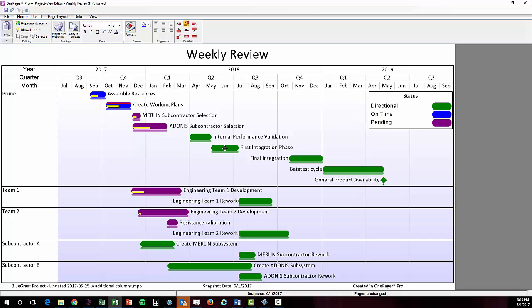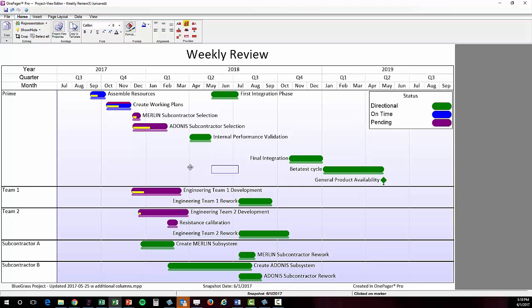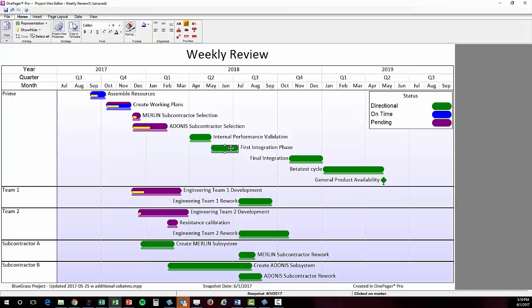There is one main exception with drag and drop, and that is while you can drag one or more shapes up and down in the view, you cannot move them left and right, and that is by design. As mentioned previously, OnePager is read only from our source file. So if your dates are off, you have to go back to your source file, make updates there, then ask OnePager for an update. OnePager can never backwards populate anything into your project. That gives these visuals more credibility and protects the integrity of your source file.